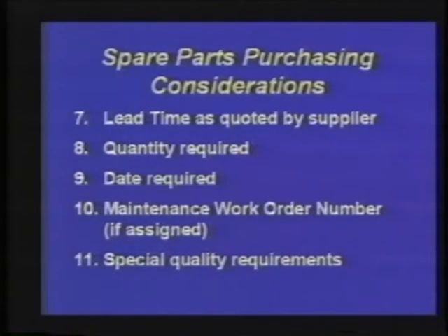And this is a key requirement for the people in the storeroom so that when merchandise is received, they know immediately what purchase order is for what planned work order, and that material can be placed in the planned work order staging area, and what purchase order is for, let's say, normal stock storage, which would be required for future unplanned requirements. Special quality requirements should be recorded on purchase orders, and those may be used when material is received and they are processed through receiving inspection.